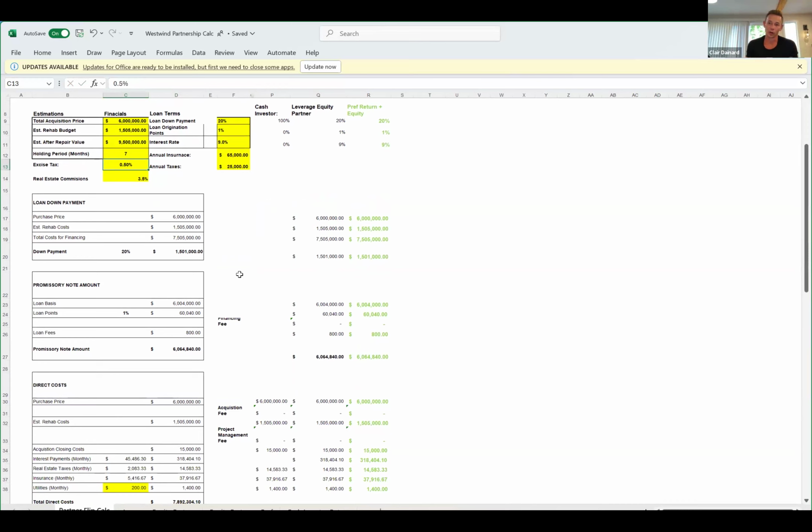If we're bringing in an operator, are we going faster? And are we being more efficient? By picking up the 2 months of hold time on this, it's going to help with my annualized return. He can now get the budget down to 1.3. You know what? I'm still going 1.35 because we're going to upgrade a couple of things, but he's probably going to be 1.35 now, and he can fix the numbers.